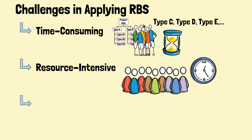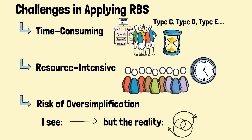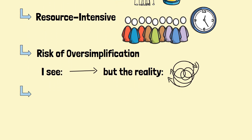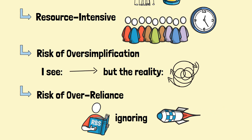Challenge number three: risk of oversimplification. The RBS may oversimplify complex risks, making it challenging to fully understand the potential impact of these risks on the project. Challenge number four: risk of over-reliance. Project managers may become overly reliant on the RBS and ignore other important sources of risk not captured in the structure.